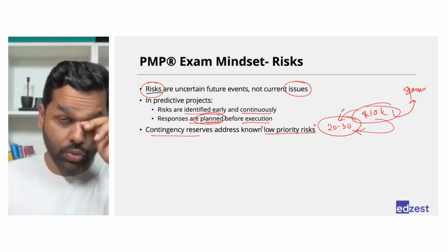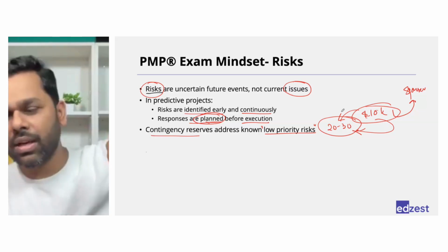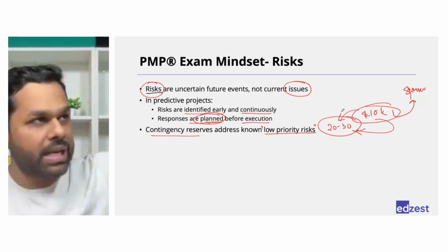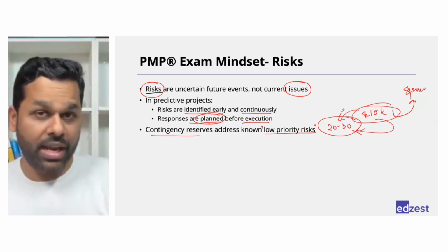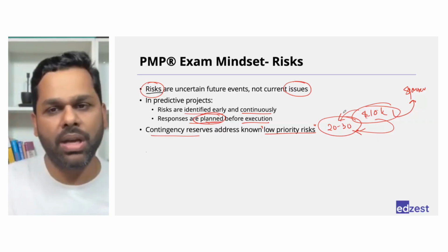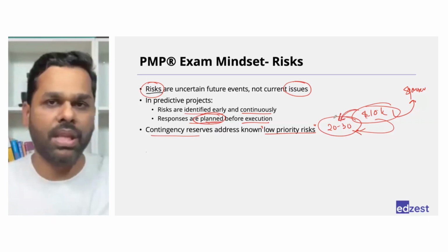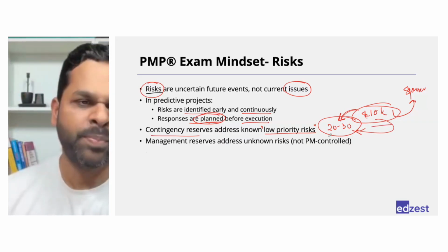Right? So you will either seek extra money from the management because of that accident, or you will claim it from the insurance company, get that money, regularize it. Okay, so I'm again repeating this. Physically, it is possible. But on paper, you should never use money which is assigned to something for something else. Okay, this will also be tested in the exam.